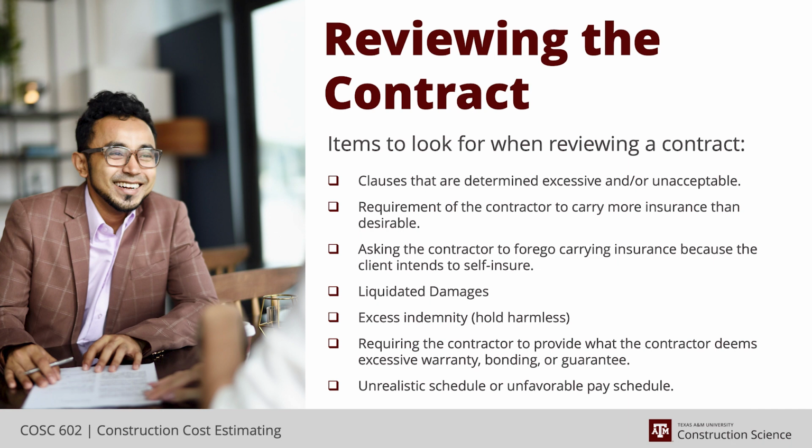I've seen warranties and bonds. The typical warranty that we see is a year, and I've seen contracts come through where they wanted a 2.5 year warranty, bonding or guarantee. Normally we're issuing bonds for 10% of the value, but some want 100%, and so the bond fee becomes quite expensive. It may push a couple of people out of the ability to compete.